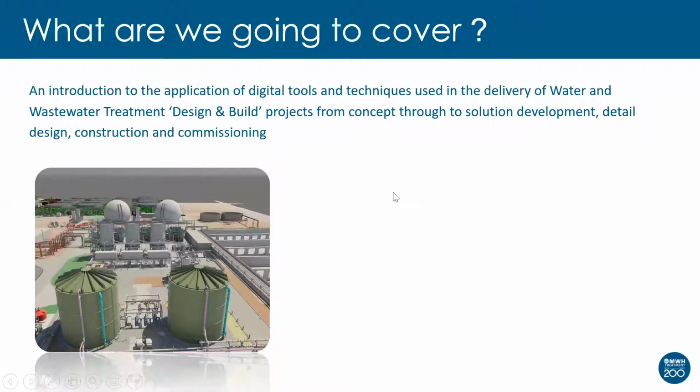But before I take you through the actual content of the following slides, just a point around the 5-year AMP cycle that we have in the water industry. For those of you that are not familiar with the water sector, our frameworks typically align to what's called asset maintenance plan periods, AMP periods, which are linked to price reviews used by the Water Services Regulatory Authority, Ofwat. These AMP periods run in 5-year durations, and we're currently in what's called AMP 7, which commenced in April 2020.